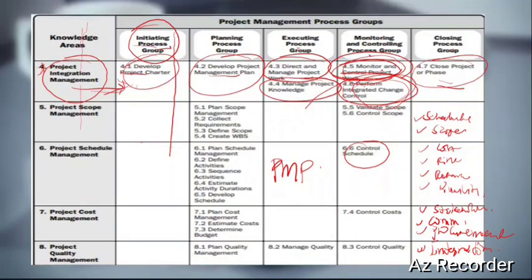And how we close a project, we need to understand. It doesn't mean finish the last deliverable and walk away. You need to basically update all your records. So if the party is done, we wouldn't say the last activity is done. So the party closed. We need to take our time and learn our lessons. If we were to have another party next year, what can we do to improve? How do we improve? What can we do better? We need to know this. What went wrong? If we were to handle another similar project next year, how much are we looking at? Now we've done it, so we have an idea of how much it will cost. So we update all our records nicely.